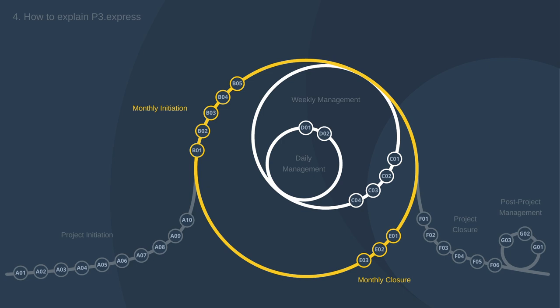The big outer cycle is monthly — we manage a P3 Express project one month at a time, which from a Prince2 perspective is exactly managed by stages. The difference is that in Prince2 stages can have any duration and don't need to be fixed. Monthly cycles make sense for most projects because they organically have elements that repeat every month. Inside the month, activities are mainly time-driven — happening every week or every day — forming the other two cycles.